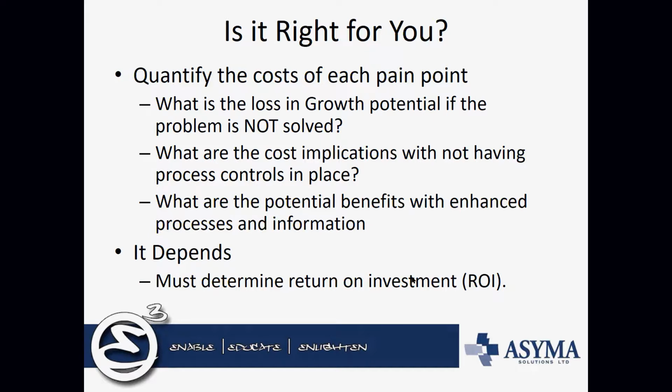What are these costs of not having this in place? We had a particular company up in Fort Mac that actually went bankrupt because somebody had done the estimating and forgot to put in a whole section of labor, and they would not let them out of the agreement because they had signed this silly thing. So all of a sudden this contractor's in some major, major problems. And that is a cost that you really don't want to incur.